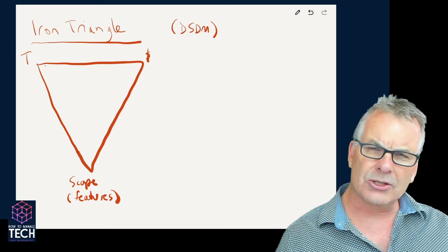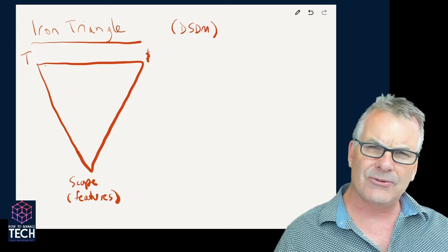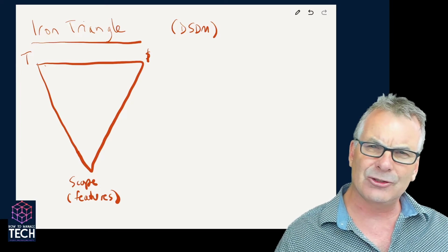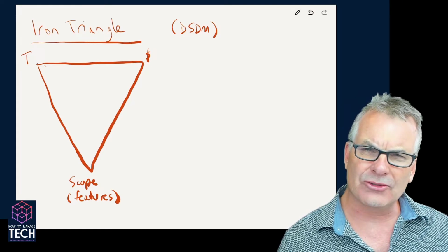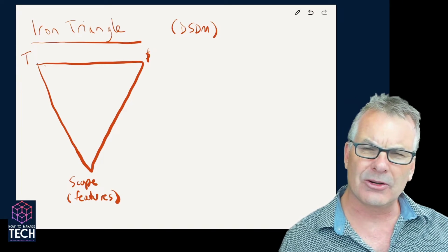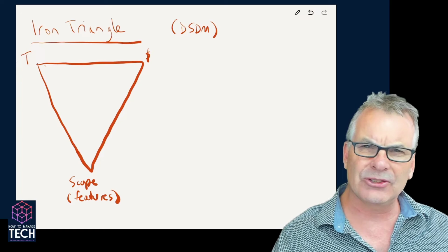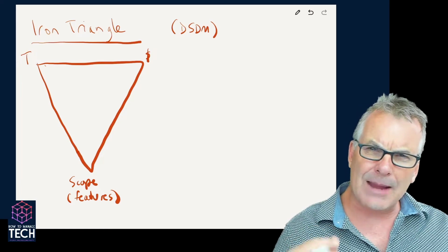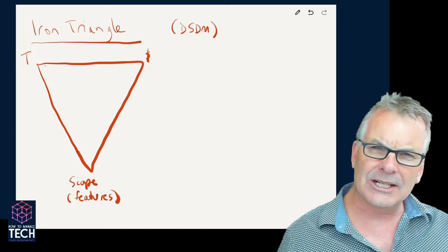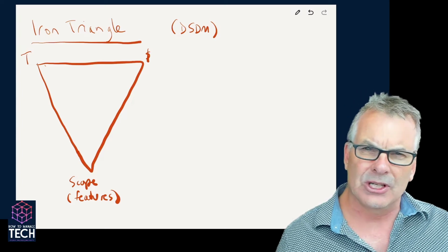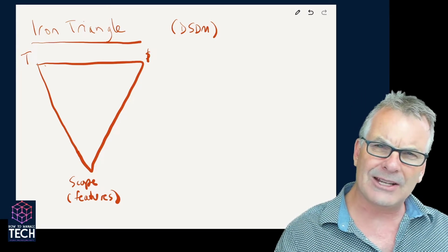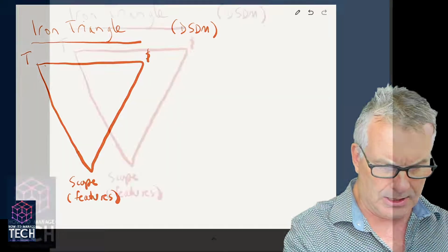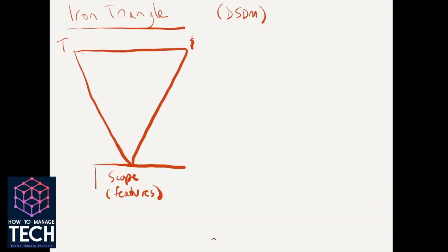When you are locked into delivering on a fixed scope, in other words a fixed specification, it's very common in fixed price, fixed specification contracts when we outsource the work to a supplier or vendor. We attempt to shift the risk of non-delivery to them. What happens is that we unwittingly set ourselves up for failure, to be honest. We lock off this scope, and if things are going to flex, they're going to flex elsewhere. I'll show you what I mean. The scope is locked off, and I want to suggest that's like a foundation, like a big block of concrete, if you like.